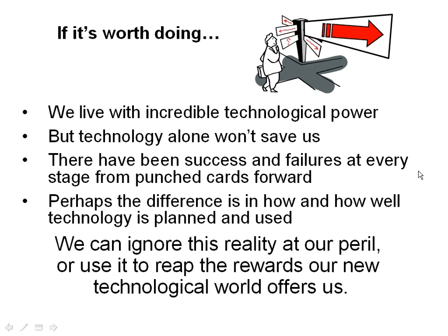Well, I think the first thing we have to do is to define what's a delay. In other words, in any project, there is kind of an imperative, and we don't always know it going in, as to how long this is going to take if we do it right. It's very important in the early stages to look very closely at, especially, the impact on the organization, because technology can move very rapidly. You can install technology, get it customized, get it up and running in a few weeks or a couple of months. But if you're talking about changes to how your organization works, which is impact on staff, on training, on skills, that is going to take longer because people don't react as fast.